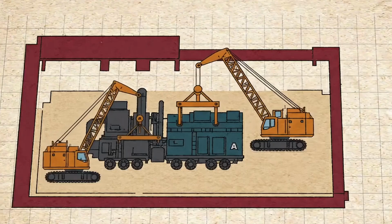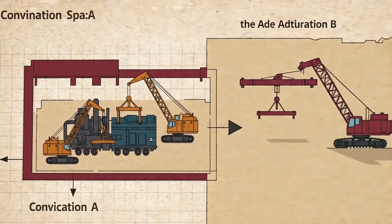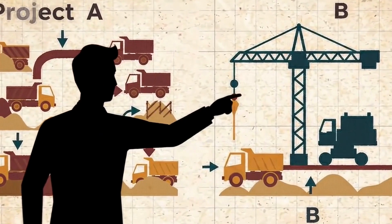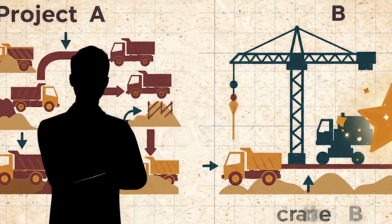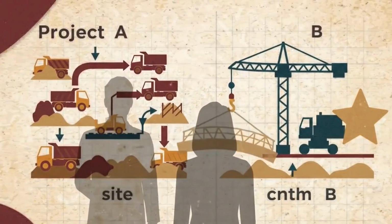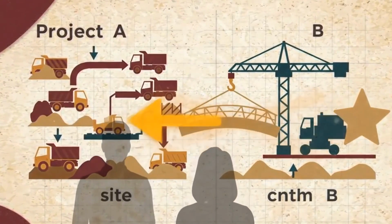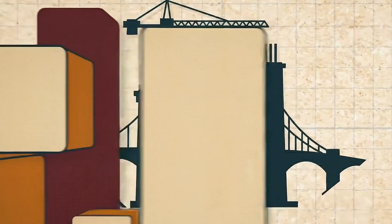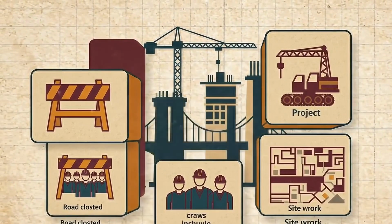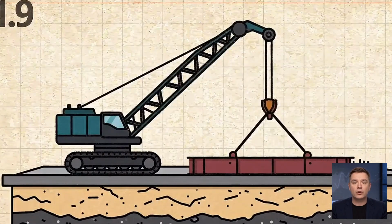For this job, the useful number is simply the one the contractor gave us, 17 initial loads. Every one of those movements has a commercial consequence, and the consequences stack. If one part of the package reaches the site while another critical part is delayed, the first arrival does not magically become productive. The crane package is only as useful as the sequence that converts deliveries into a working asset. That makes coordination itself valuable because the owner is not simply dispatching independent trucks. It is trying to make a temporary production system appear on schedule.